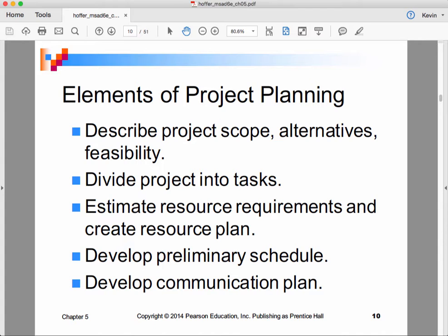This is especially important if you intend to release the software for use in the field more than once in the project. So if in fact you're going to have 3 software releases, well, then you have to have some idea not only of the features you're going to work on in terms of user stories, but you also have an idea what order you might like to work on them to make sure that you have releasable units of software at the times you would like to do that.